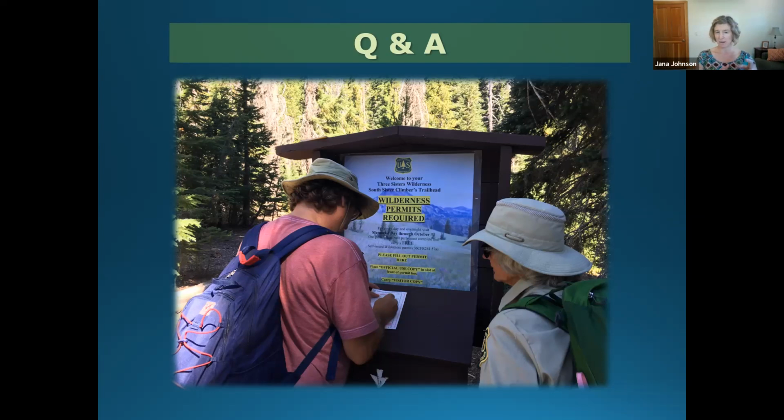And I might not be on target here, but if the NEPA being done is a categorical exclusion or something that's a less cumbersome form of NEPA, depending on the action being analyzed, and you're asking to fund that NEPA and then the project that the NEPA is being done on, we wouldn't be able to do that because we'd have to have that NEPA approval done first before funding a project.